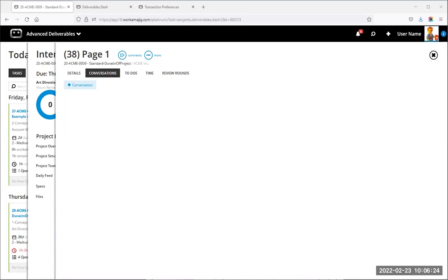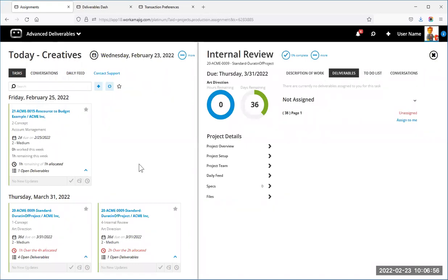And then continuing on with that question, Aaron, you also said, I have a project with up to 200 articles, deliverables, and I'm wondering if this option would be good for that project. We currently save content on comms and Trello. Yeah, if you're utilizing 200 plus deliverables per project, that's exactly what this whole deliverable board is for. That way you're able to manage a greater volume of work with creating fewer projects and less task management. But I'm assuming you're okay with breaking the resource management piece a little bit, because we're not assigning things at that minute of a task level.